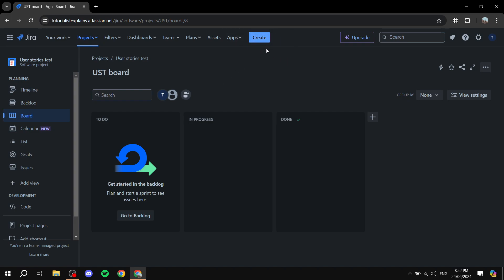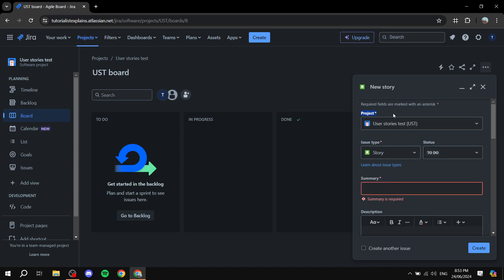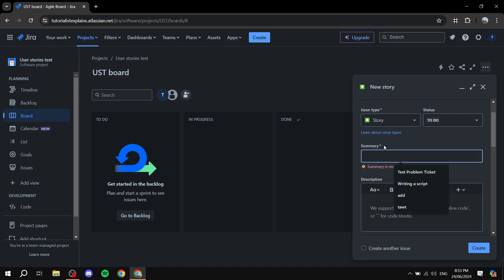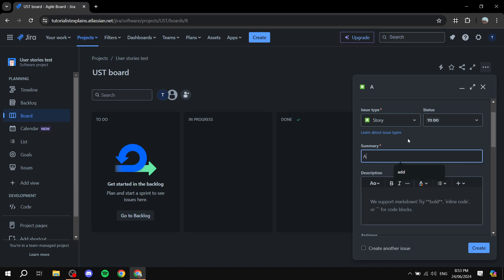First, click 'Create' at the top of the screen to create an issue. Then select the project you want to create it in. The most important part here is selecting the issue type — you have Story, Task, Bug, and Epic, but our focus is on Story. Select 'Story' as the issue type. For status, leave it as 'To Do.'